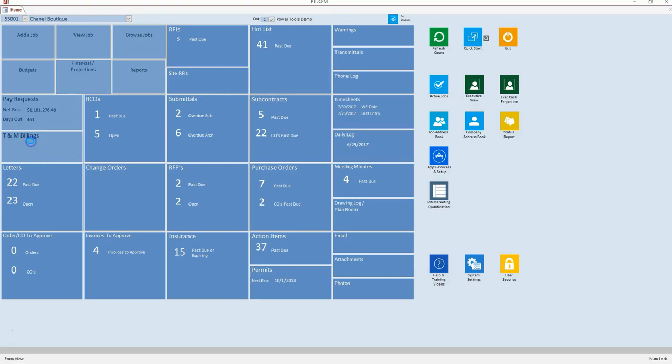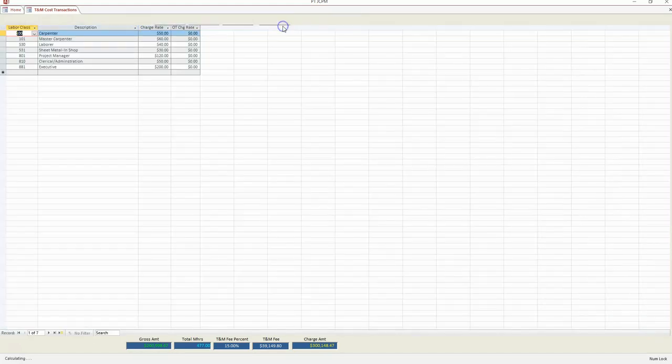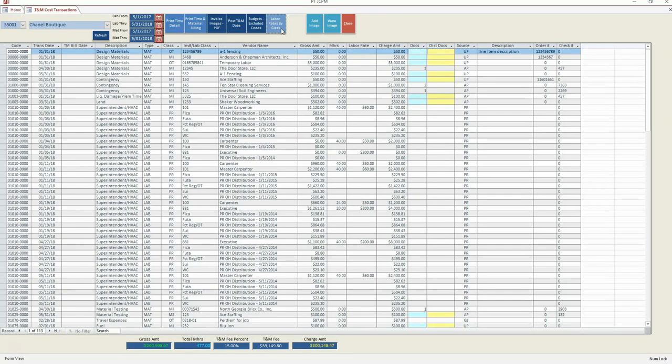Tnm Billings create invoices for time and material jobs for a specific time period. Posting captures the data invoiced and will pick up any data entered for a prior period not yet captured. Payroll may be billed as a charge rate per labor class and includes both a base rate and an overtime rate. Add additional markups for labor, equipment, and subcharges. PDFs associated with invoices can be rolled up into a single PDF for the selected Tnm Billings.